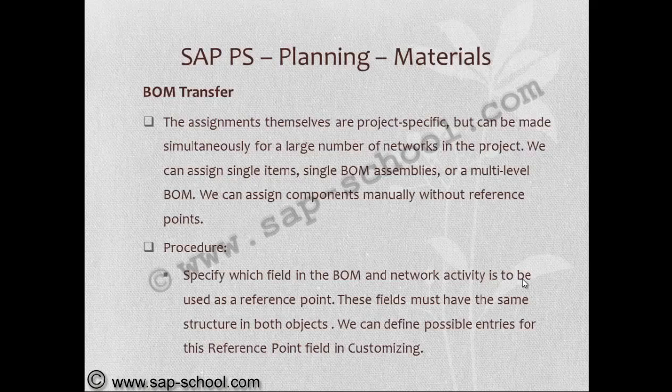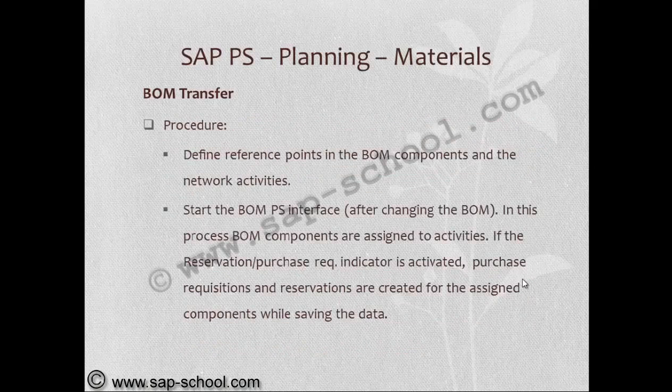How to do this? The procedure will be to specify which field in the BOM and network activity is to be used as a reference point. These fields must have the same structure in both objects. We can define possible entries for the reference point field in customizing. Define the reference points in the BOM components and the network activities.